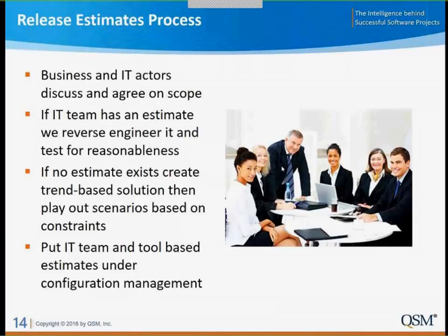And then finally, we want to put both of these solutions under configuration management so that we can produce our as submitted and our adjusted, risk adjusted solutions later on when we do the portfolio roll-up.